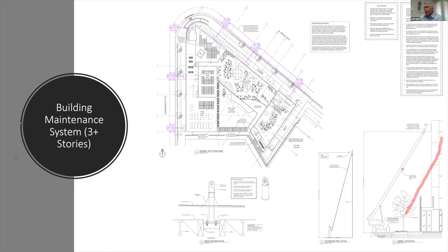A quick mention just on exterior building maintenance systems for you guys. If you forget an exterior building maintenance system in California, and I've now had this happen from San Rafael to LA, you have to basically rework the structure of the roof.